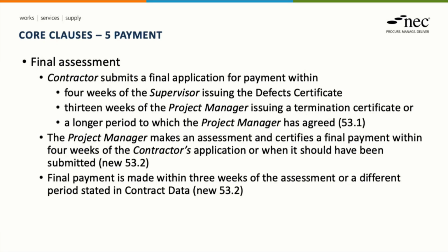So the application needs to be submitted within either 4 weeks of the defect certificate or 13 weeks of a termination certificate. But there is flexibility for the parties, the contractor and the project manager, to agree a longer period within which the application is made. Once the application is made, the project manager certifies the final payment within 4 weeks, and then the payment is made within 3 weeks of the certification, or a different period if stated in contract data.